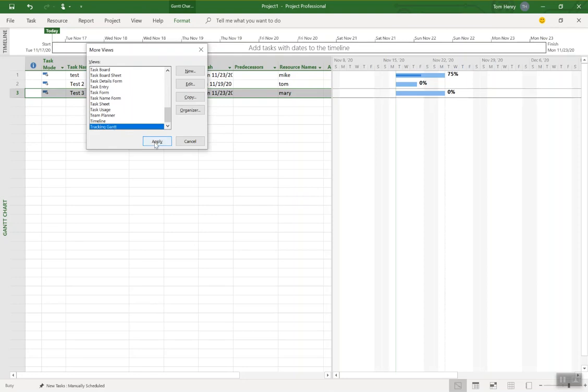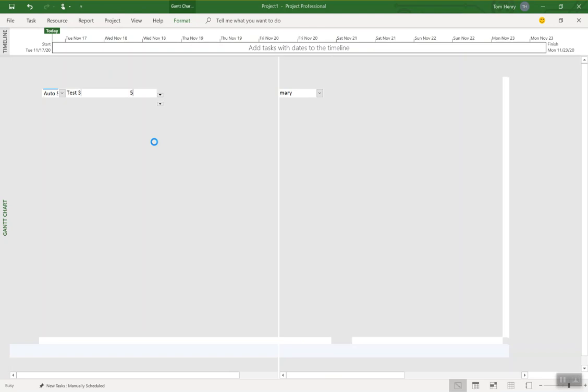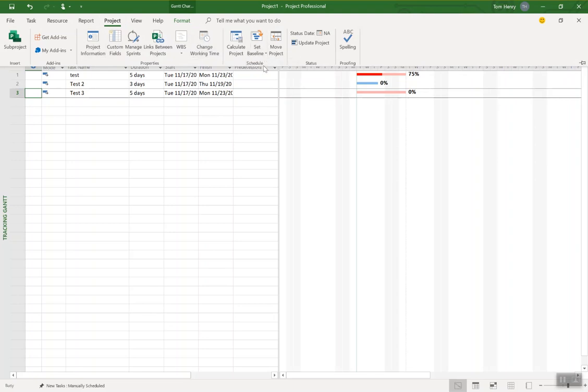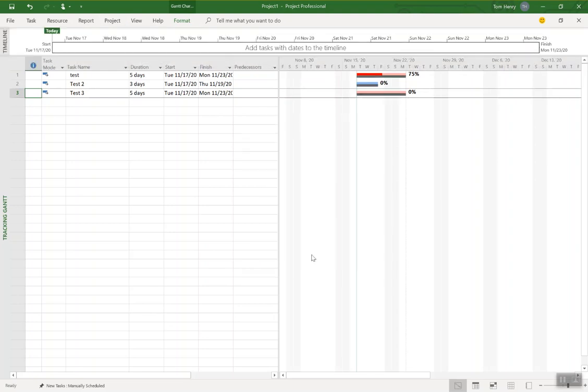Adequately named. I can click apply. And I see the tracking Gantt. By default, it's going to show the percent complete as the labels on the right-hand side. Slightly different view. It shows you the percent complete here. And you can also see baselines and things like that within this view should I have set a baseline. And you should see my other video about how to set a baseline. But there you go.